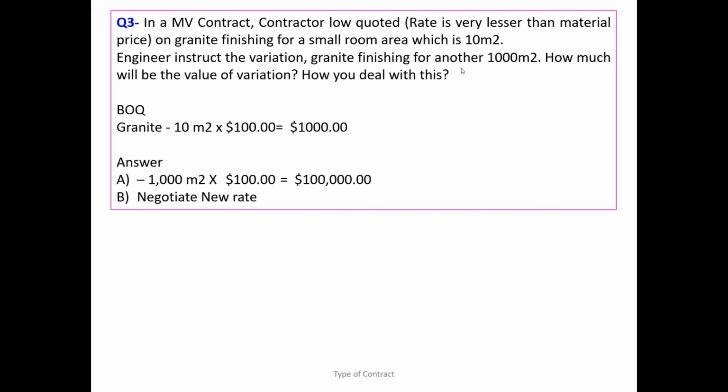Another thing is, in some jurisdictions they will say you follow what you have signed in the contract, because your contract stands for measure and pay, where your rate is bound, and you have to follow it regardless of the quantity. But if you have conditions like a FIDIC standard, they have limitations.